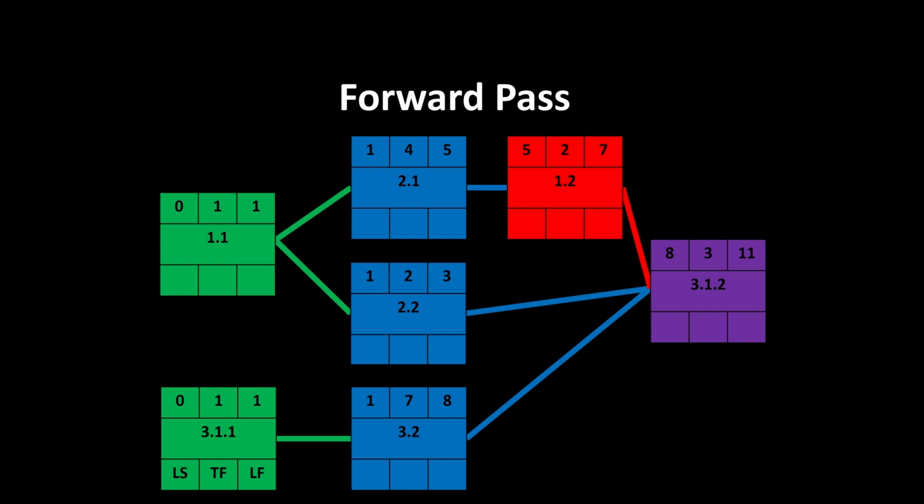So where you've got a choice of numbers to carry across on the forward pass, you always pass the highest number. In this case, it's 8. It's not 3, it's not 7. We're passing the 8 across. And then we've got 8 plus 3 gives us our 11.